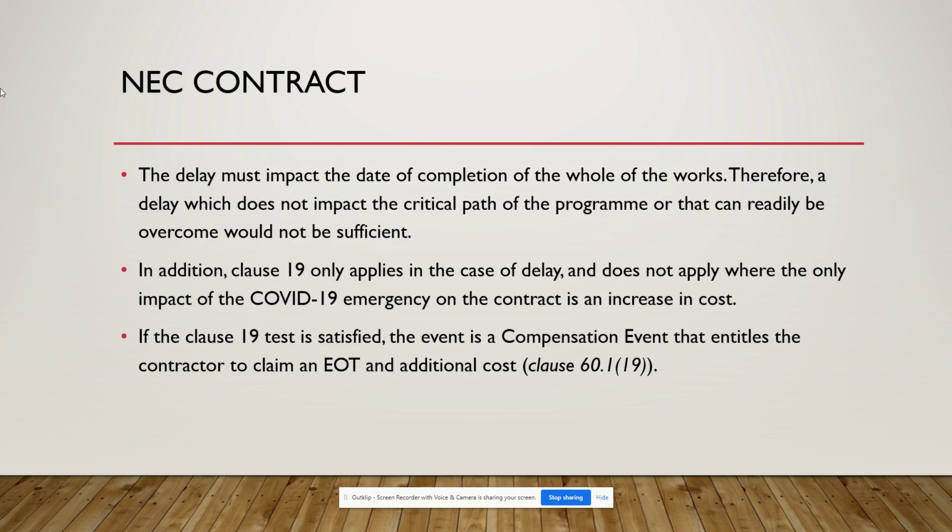And what they are saying is that this delay must impact the completion of the whole of the works. That means it should affect the critical path. If it affects a non-critical path and does not delay the completion of the whole of the works, then you can't claim.